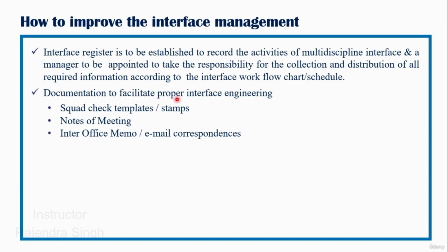Documentation to facilitate proper interface engineering will include spot check templates, IDC stamping, and minutes of meeting for any interdisciplinary meeting that has happened. Inter-office memos or MOMs, or some email correspondence, can be used as evidence that the spot check or IDC check has been done for a particular document.